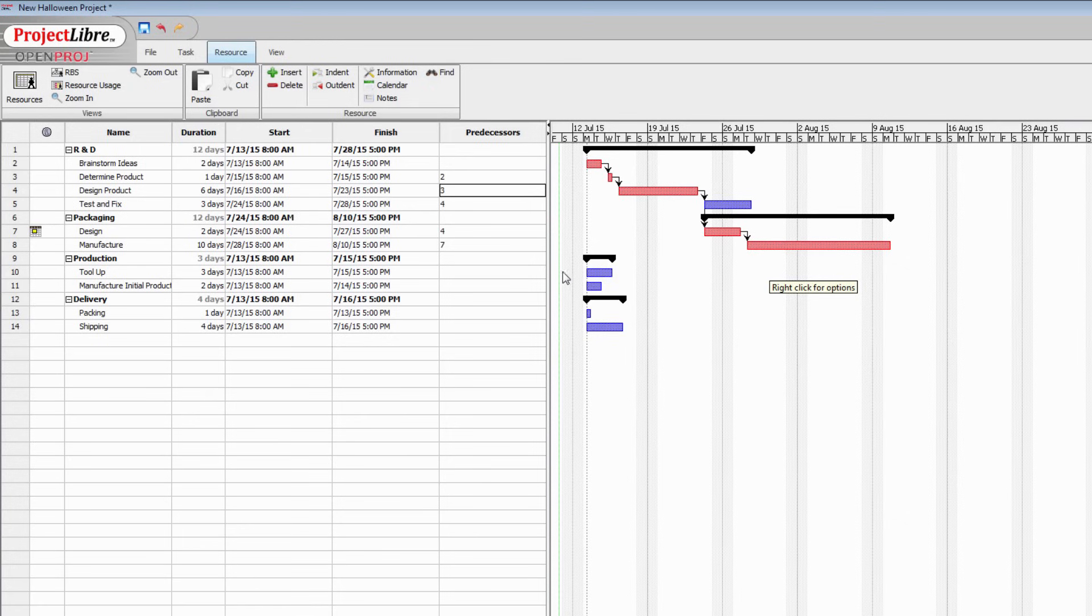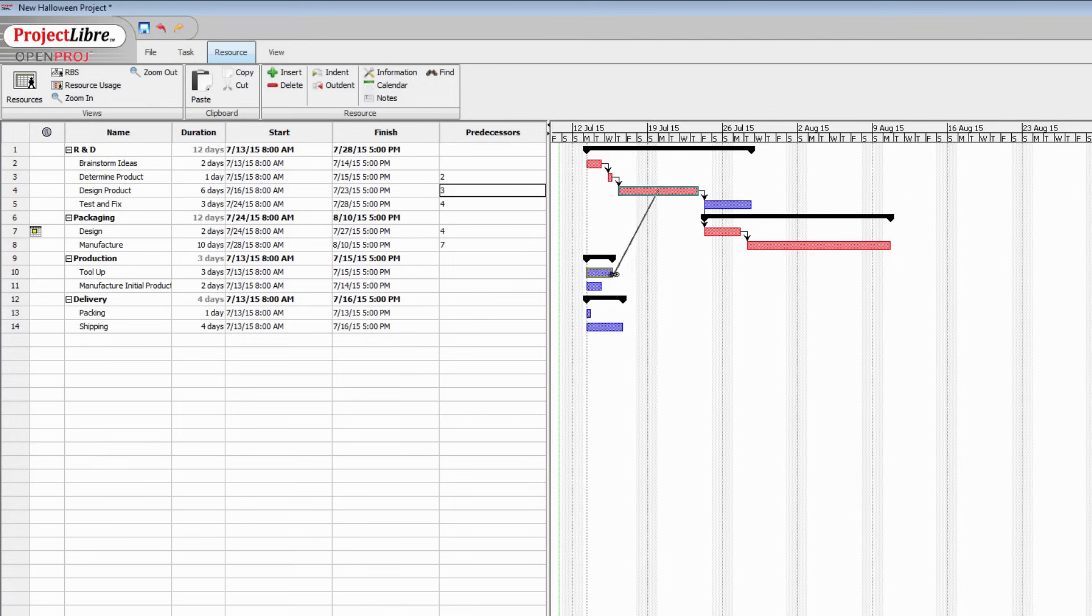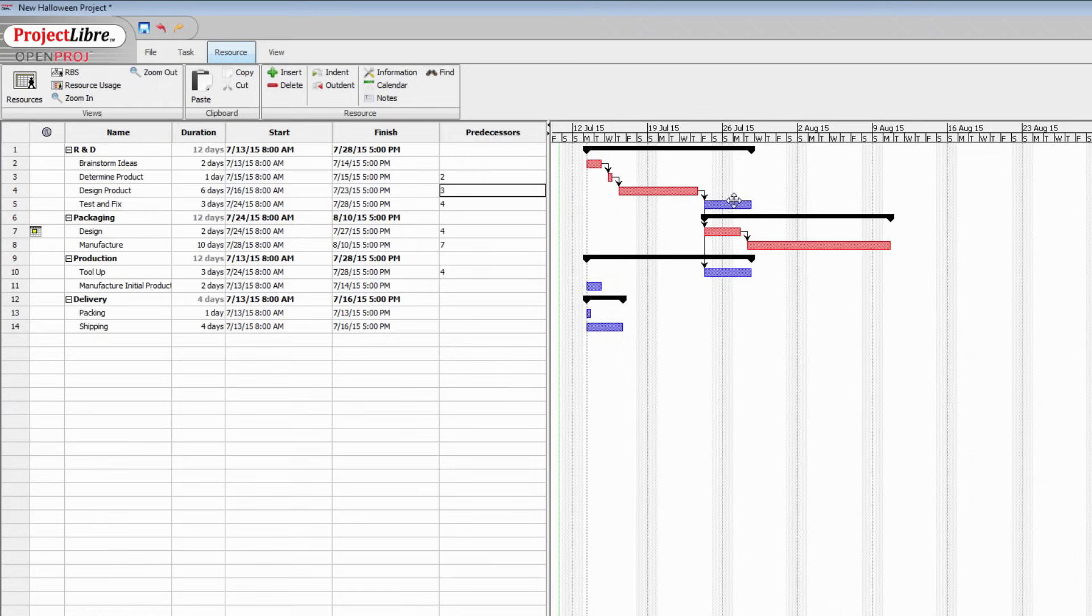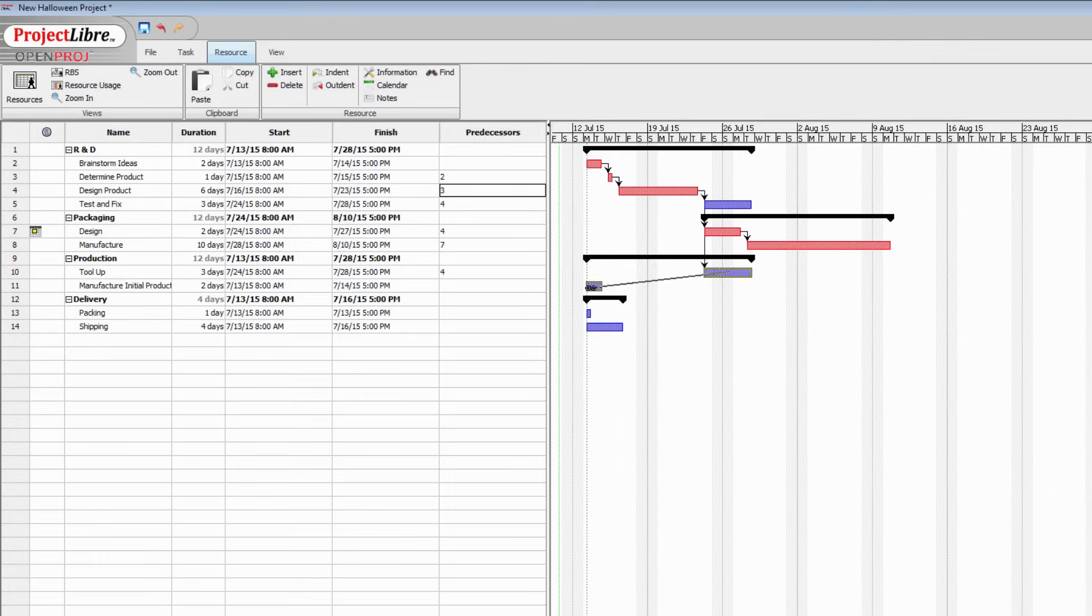Now let's look at our production. Well we can start tooling up as soon as we've finished designing the product. So again, we've got a dependency here. Once we've finished designing the product, we can start working on tooling up. And that can take place alongside testing and fixing. Manufacturing the initial product, well that can't take place until we've got our production plant tooled up. So there's a dependency here. Another finish to start dependency.